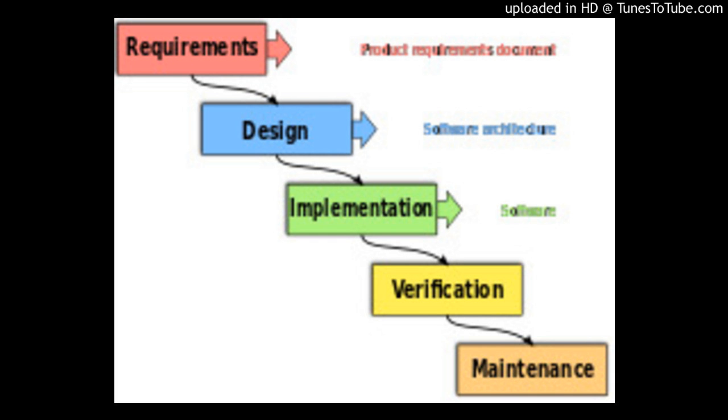Emphasis is on planning, time schedules, target dates, budgets and implementation of an entire system at one time. Tight control is maintained over the life of the project via extensive written documentation, formal reviews, and approval and sign-off by the user and information technology management occurring at the end of most phases before beginning the next phase. Written documentation is an explicit deliverable of each phase. The waterfall model is a traditional engineering approach applied to software engineering.